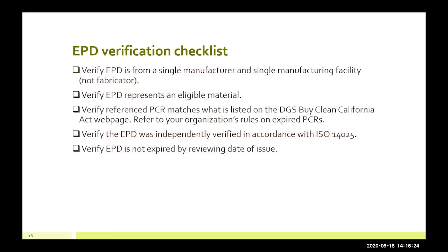Fourth, you want to verify that the EPD was independently verified in accordance with ISO 14025. This is a simple checkbox because there's a signature on the second page of an EPD that declares that the EPD's information was third-party verified, and it's an easy check to make sure that the data that you're looking at wasn't just self-declared by a manufacturer. And then lastly, you must verify that the EPD that you're looking at is not expired by reviewing the date of issue. So next slide.